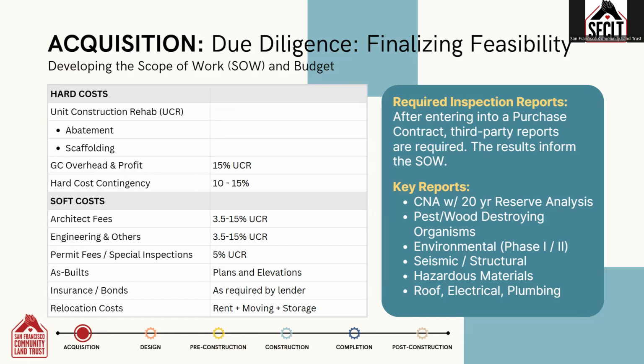These consultant reports also won't include any soft costs associated with the work, like structural design fees, special inspection fees, permit fees, or the cost of as-built. And these consultant reports won't consider impact to the residents and relocation costs associated with the work. It's the construction manager's job to be thinking about these additional line items that need to be included in the budget.